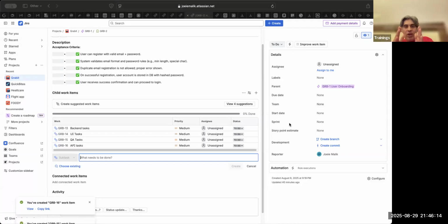You have to think from a QA perspective, in terms of how much effort there is compared to a baseline story. This story is 3 times more difficult, thinking in terms of QA only. If the baseline story is a 2-pointer, is it 2 times more difficult, 3 times more difficult, 4 times more difficult? For this one, I thought of it from a testing perspective that it is not much difficult